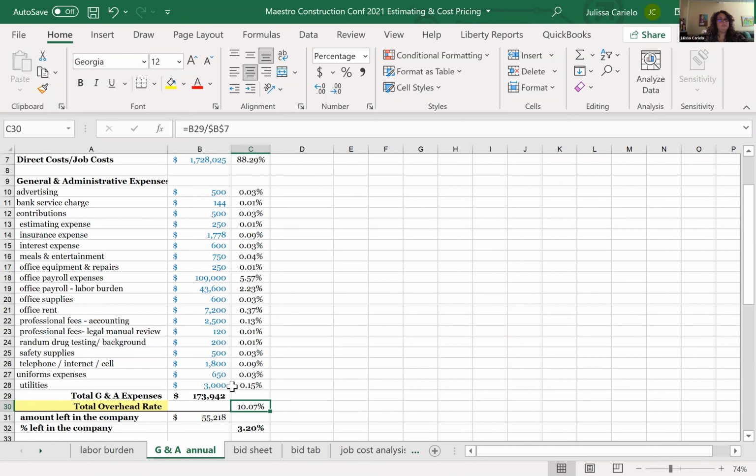And so what you want to do is add this 10% to every proposal. And this is separate from profit. This is not saying this is the amount of profit and then you don't bring anything extra, right? This is saying I'm going to add profit, and I'm also going to add a G&A cost to run the company. So I'm covered on every proposal that's going out.